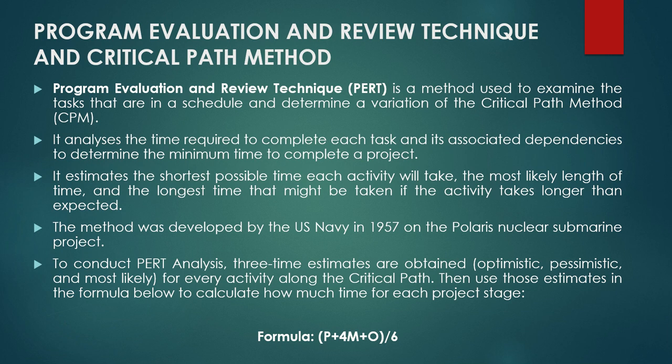There may be certain activities which cannot be started prior to the previous activity being completed, right? For example, if I have not assembled all the raw material, I cannot start the production. So the production activity is completely dependent upon which activity? Assembling of raw material. So in program evaluation review technique and critical path method, we identify the dependency of one activity over another activity.